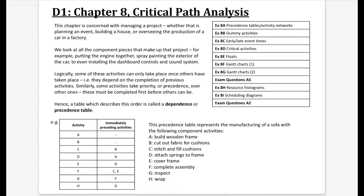Some of these activities can only take place once others have taken place — they depend on the completion of previous activities. Similarly, some activities take priority or precedence over others and must be completed first. A table describing this order is called a dependence table, or most commonly a precedence table.